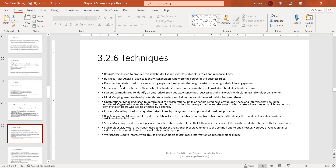Techniques used in this task include: brainstorming, used to produce stakeholder lists and identify stakeholder roles and responsibilities; business rules analysis, used to identify stakeholders who are the source of business rules; and document analysis, used to review existing organizational assets that might assist in planning stakeholder engagement — such as operations workflow repositories — to help determine current state.